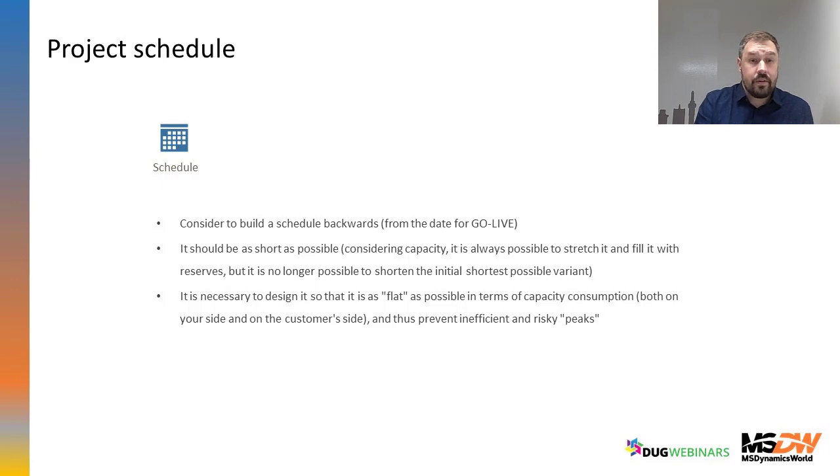And the third thing is to make the project schedule as flat as possible in terms of capacity consumption. We would like to prevent any risky peaks, like right now all the developers should develop, right now all consultants or testers should test, right now every customer's employee should only test the solution or learn something. These peaks are usually dangerous.